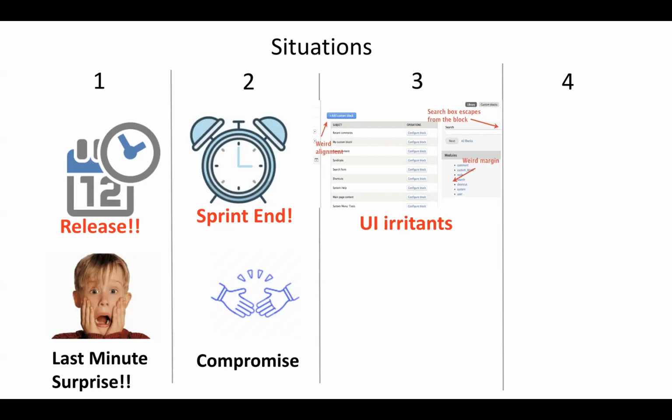In my experience, another smart option is to add these trivial things to one of the upcoming stories in the coming sprint.